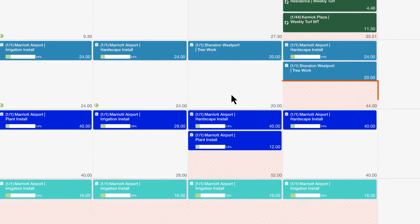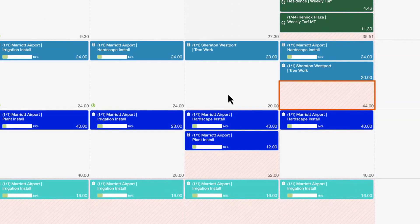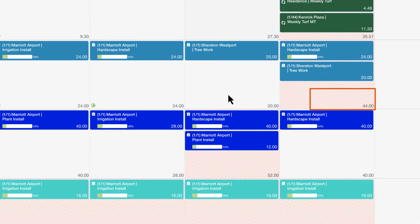And notice days displayed in red indicate the crew may go into overtime based on the total number of estimated hours for that day.